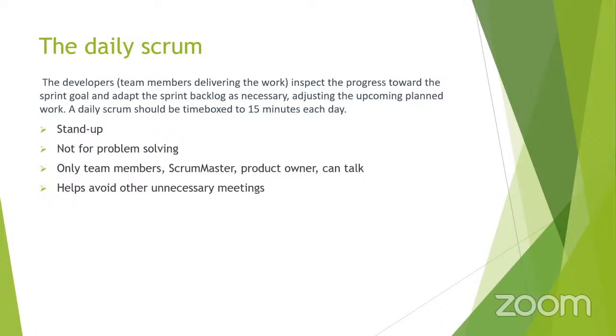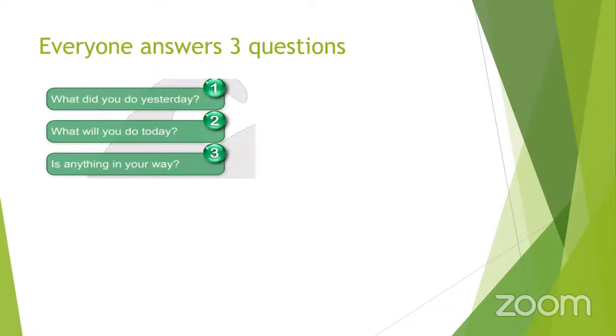It's not for problem solving, but it is a place where we can say, what did you do yesterday? What are we going to do today? And is there anything blocking your way? So these are the 3 questions everyone will be answering. It is a quick 15-minute session. And once they have given their updates, they can continue doing the work. The main intent is to make the team members responsible in front of their peers for what they're going to do today.